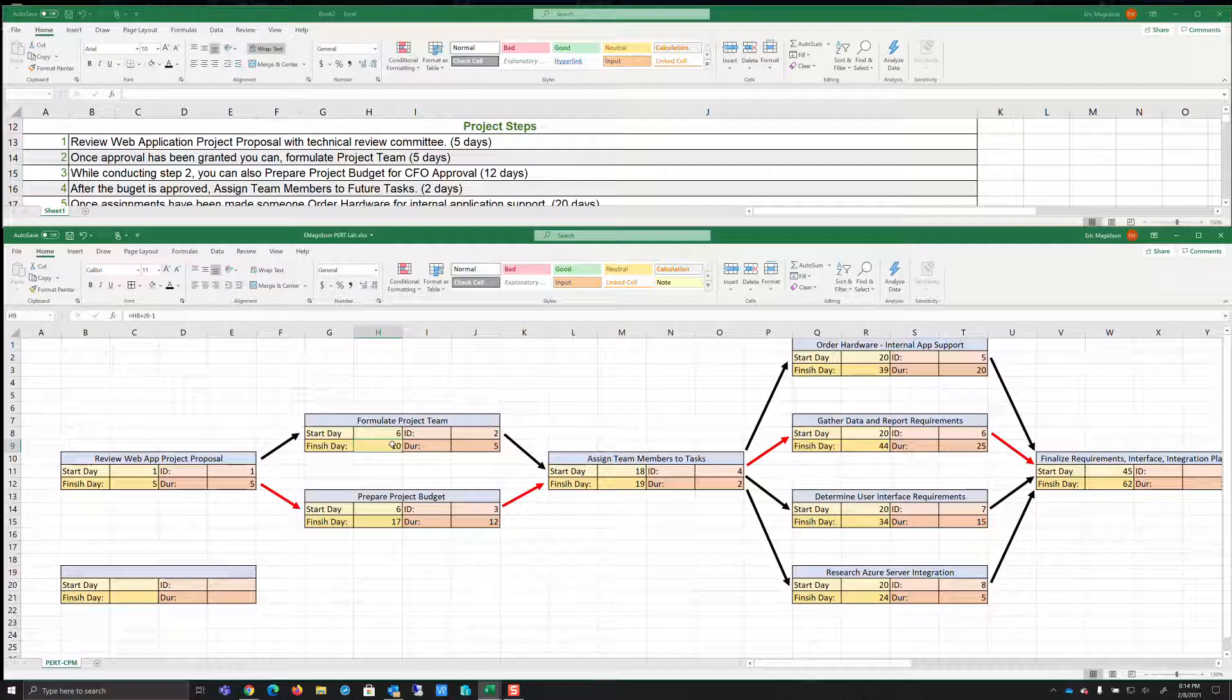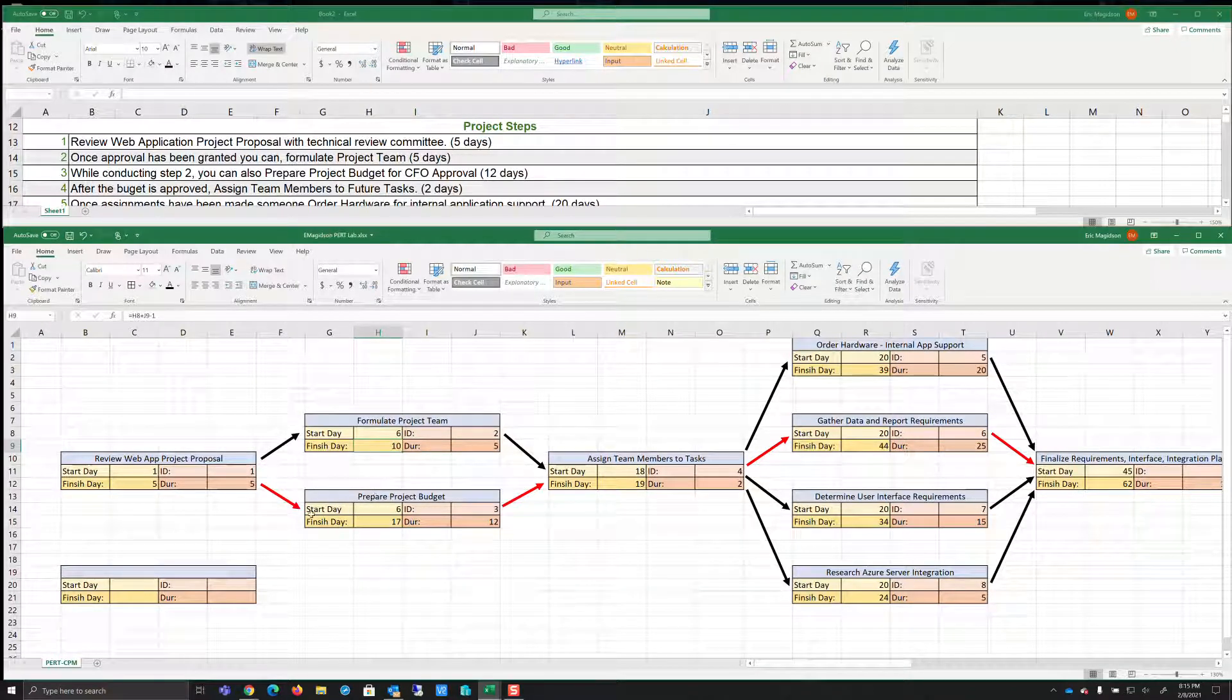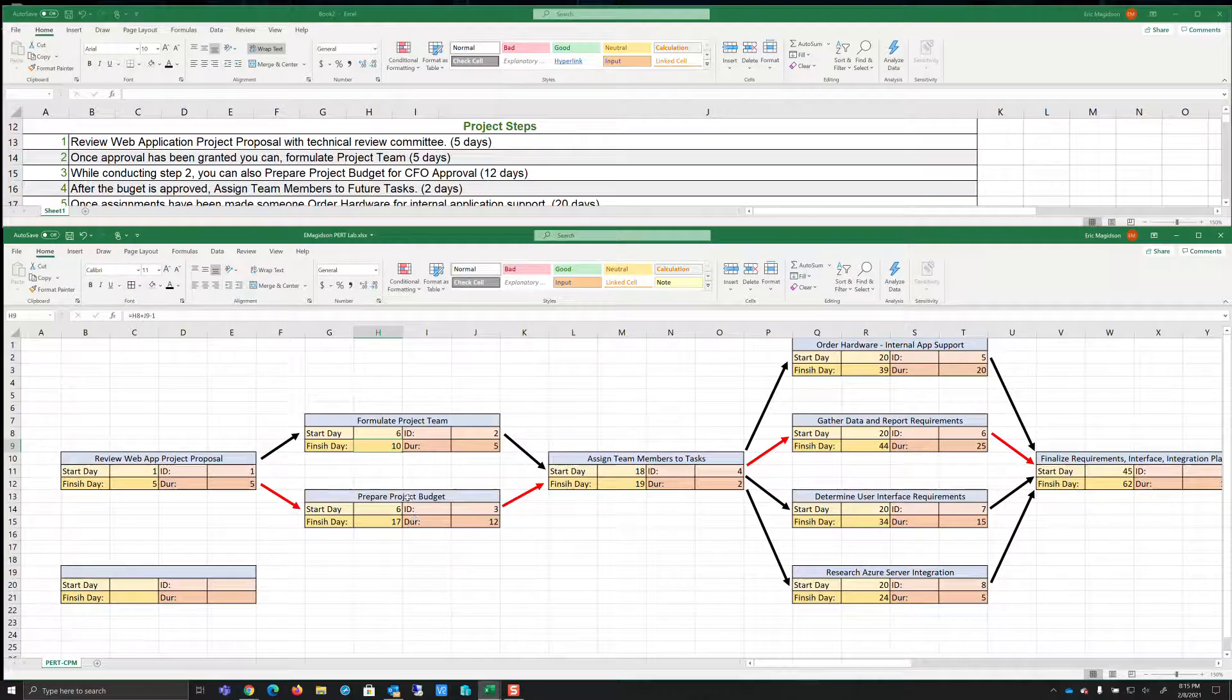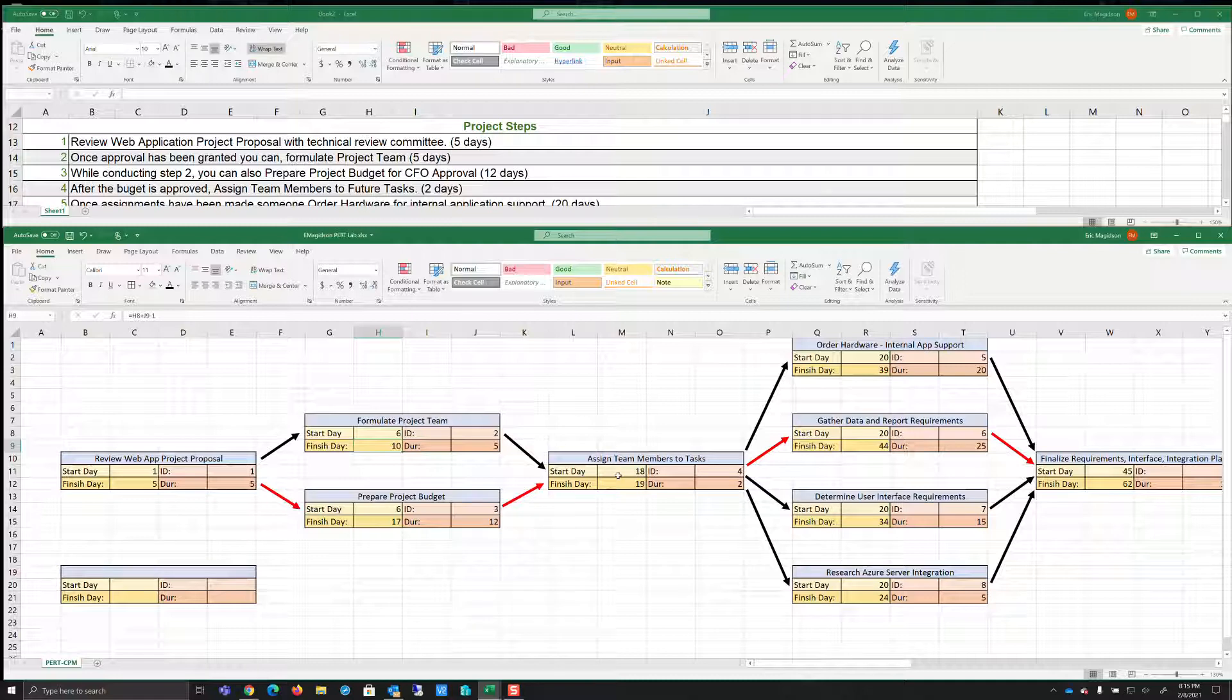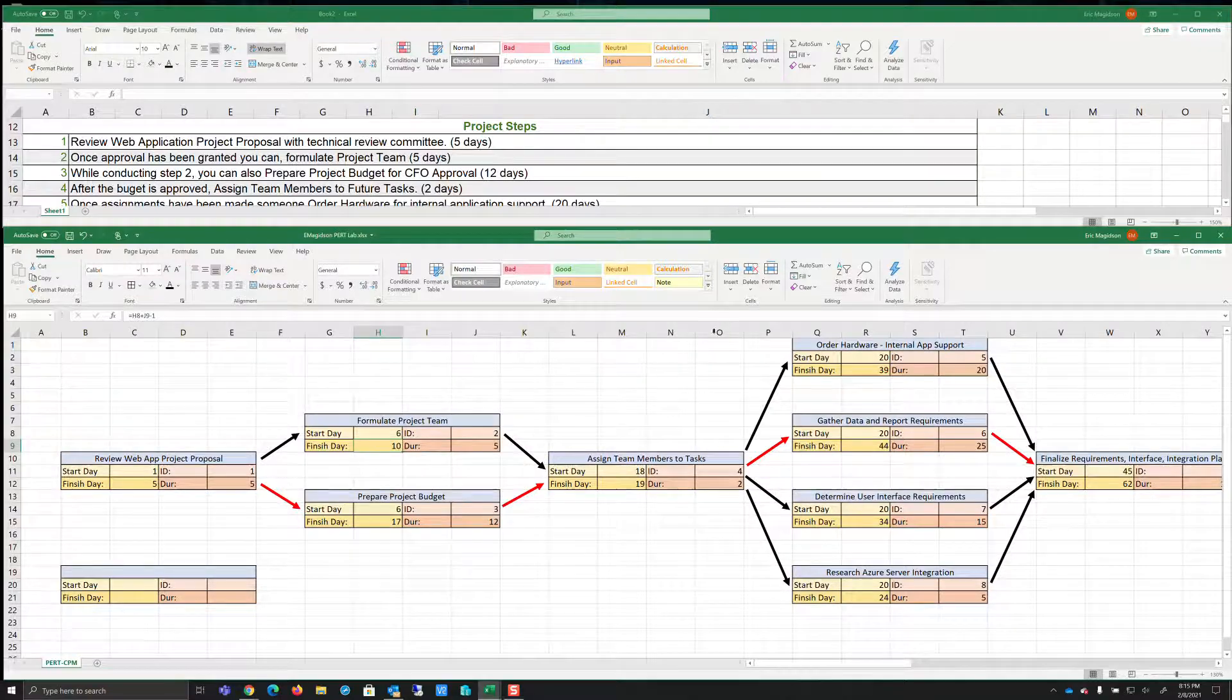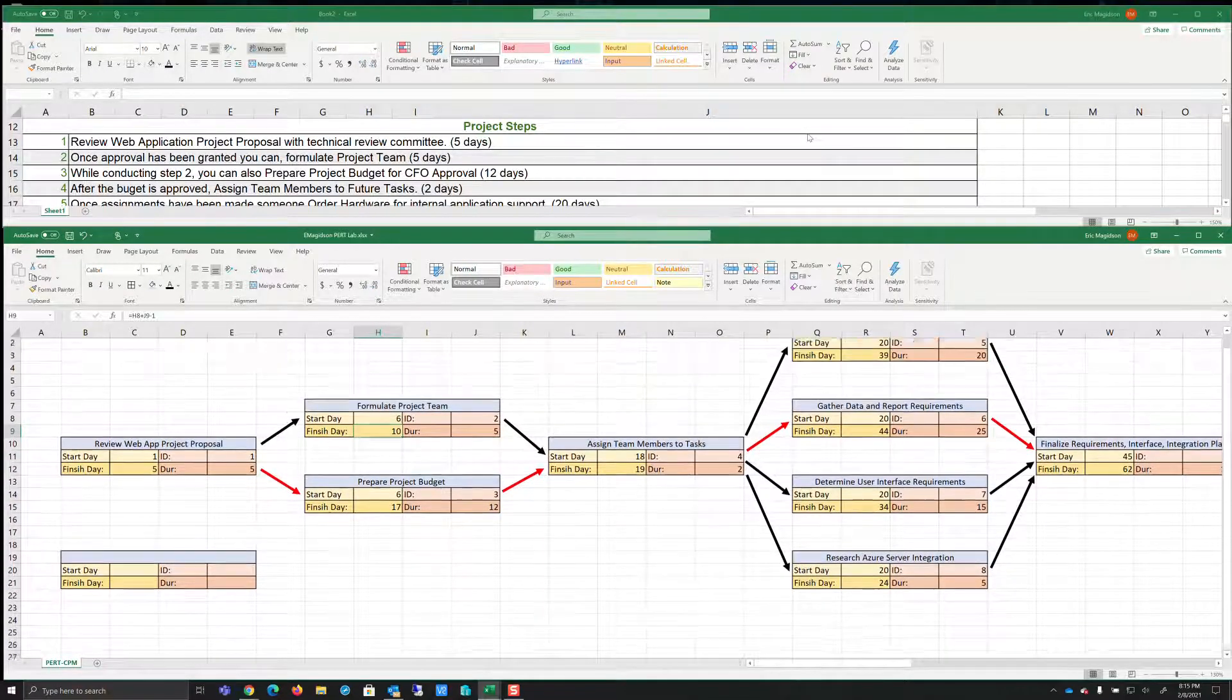So hopefully that is clear to you. If not, let me know and I'll explain it in detail offline. So here we are again. And this time my longest finished day is 17. So I'm going to start my next task on 18 and it says after the budget is approved. Now it just so happens that the budget is the longest day between these two tasks, right? So I know that I'm going to actually start this when this is finished, thus 18. So it says assign team members to future tasks. Well, that only takes two days. 18 plus two is 20 minus one is 19. So I'll finish that on the 19th day.